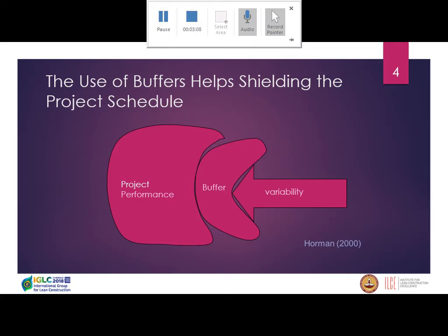While they help us to smooth out the production, from a lean perspective they are not required by the end users. So they are a non-value adding component of the projects, and they are waste. So it's very important to have a clear strategy to eliminate or minimize buffers in our project. If we decide to keep buffer in our project, despite knowing it's waste, then we need to have a certain buffer design in our project which helps us to have optimum buffers.